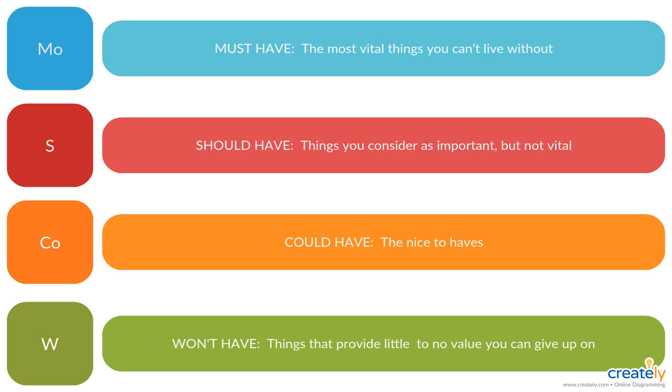And sometimes people wonder why you're ordering things that are in the should-have category. Well, as we're going through the project, if we have something in the should-have category and we have confidence that we're going to get everything in the must-have category finished, we want to know, if we have extra time, what's the very next thing we should work on? And we don't want to have to go back and have a lot of meetings and discussions. So you order that should-have list, and the team knows they can just take the first thing off the list.